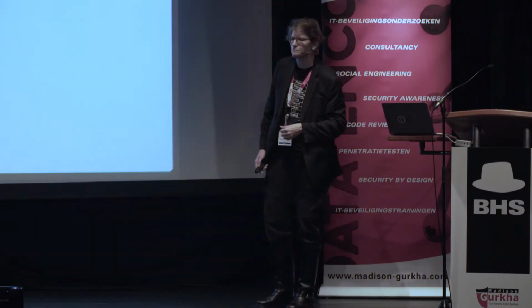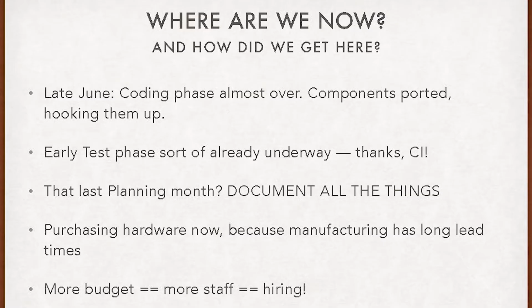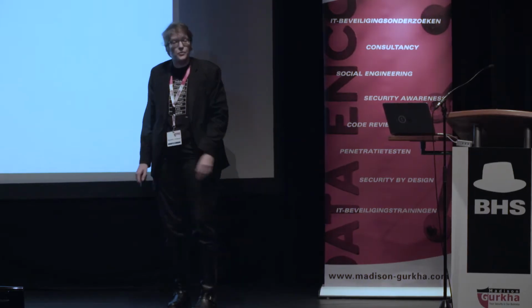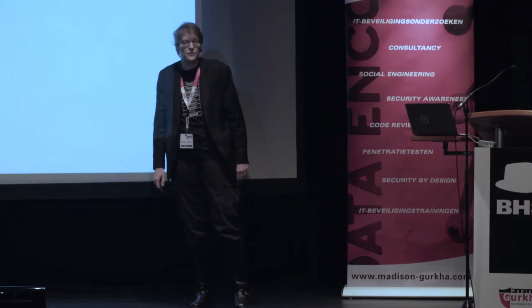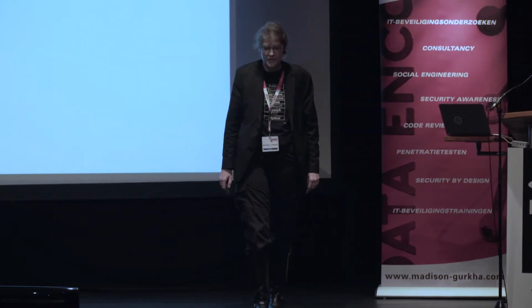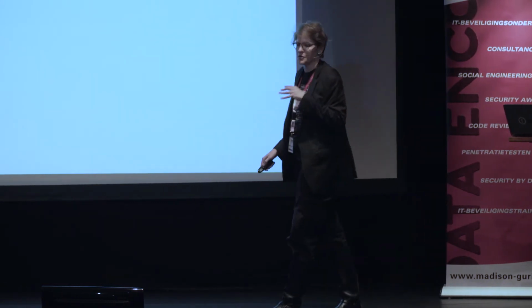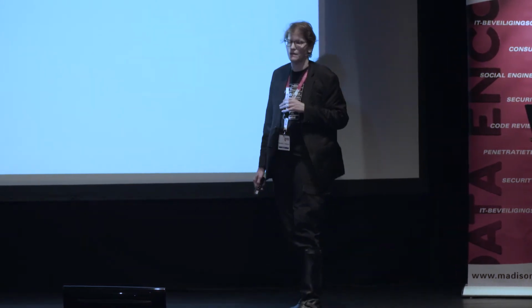So how did it all work out? Well, now it's late June. Coding phase is just about done. All components were ported in 2 months, and we are hooking them up now. The early test phase is already sort of underway thanks to continuous integration and our insistence on making things talk to each other as soon as is humanly possible.